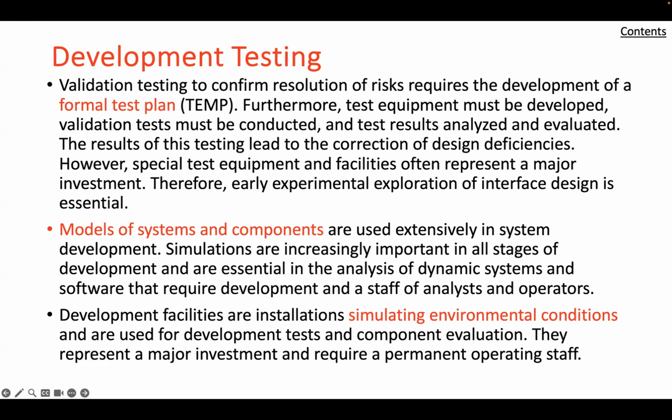Development testing should not be confused with what is traditionally referred to as developmental test and operational test. Developmental testing typically involves the engineered system within a series of test environments under controlled scenarios. This type of testing is conducted by the developer. Operational testing is also on the engineered system, but involves a customer and is conducted under more realistic operational conditions, including environments and scenarios.